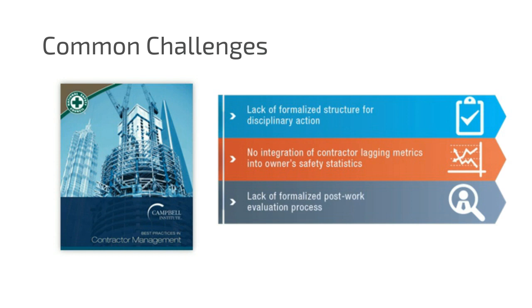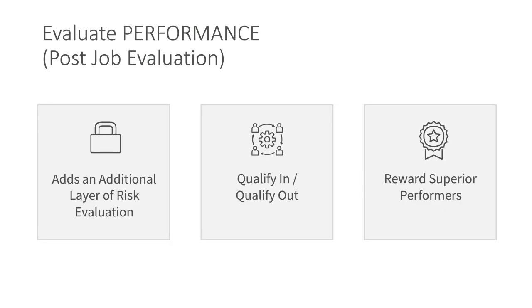The last point: lack of formalized post-work evaluation process. Again, companies struggle. Most organizations are happy that the job is done. It's been completed. Might be on time, might be under budget, and so there's a rush to commission the project, get it started, and move on. There's a lot of lessons to be learned by looking at a post-job evaluation.